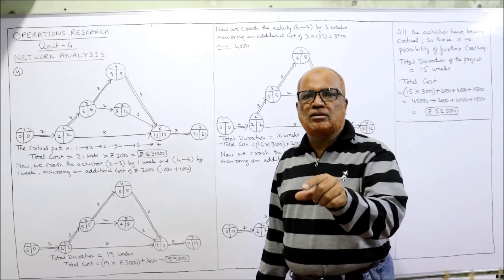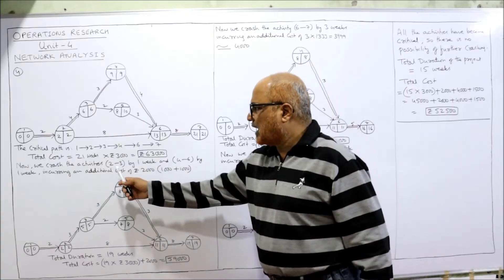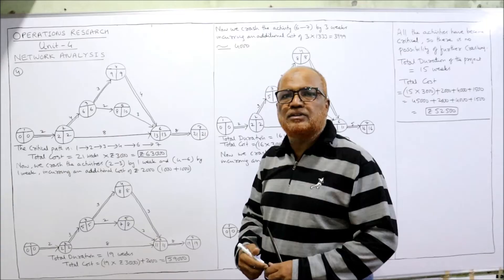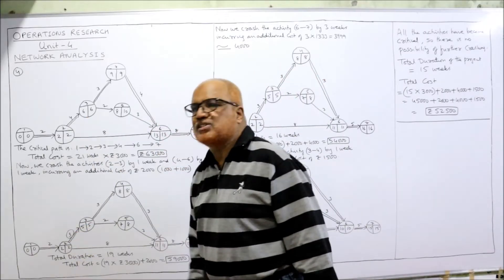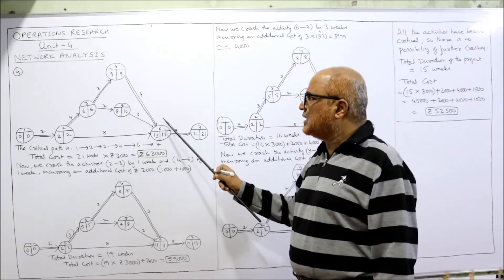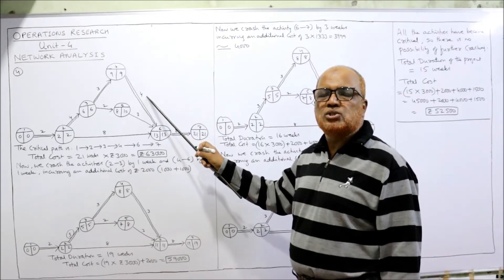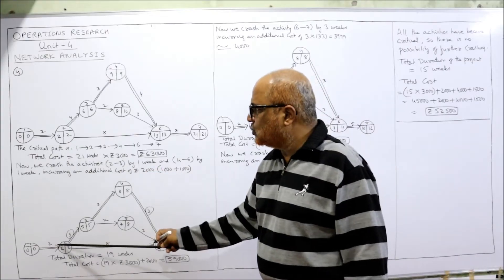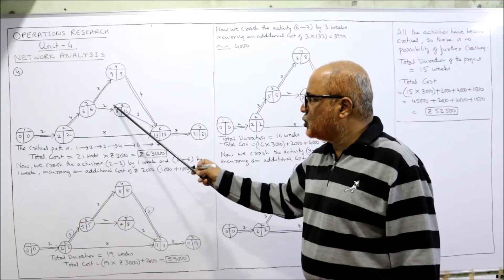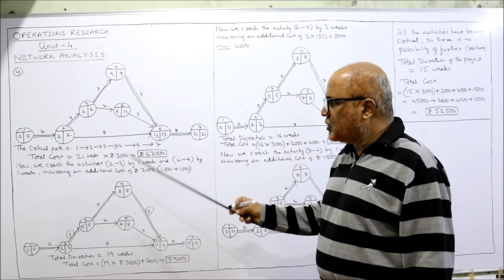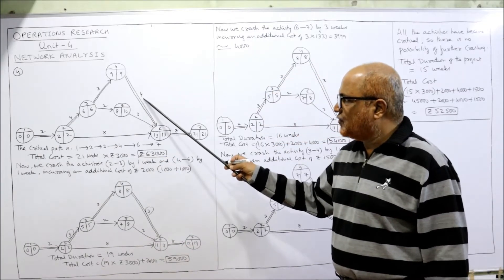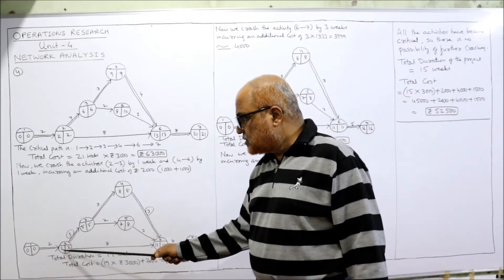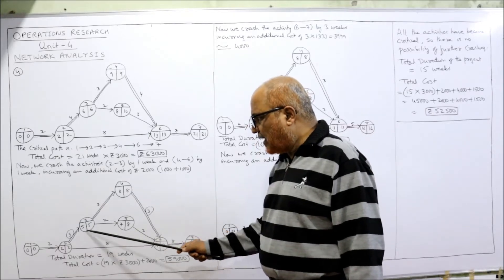Now update the diagram: activity 2→3 changes from 4 weeks to 3 weeks, and activity 4→6 changes from 4 weeks to 3 weeks. All other time estimates remain the same: 2, 8, 3, 2, 3, 8. Recalculate EST: 0+2=2, 2+3=5, 5+3=8, 5+2=7. At node 6, three arrows merge — take the maximum: 8+3=11, 7+3=10, 2+8=10 — highest is 11.